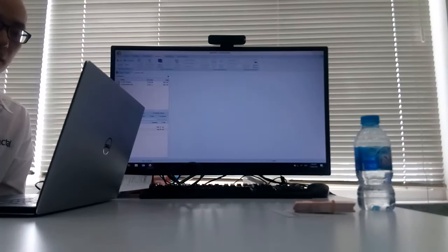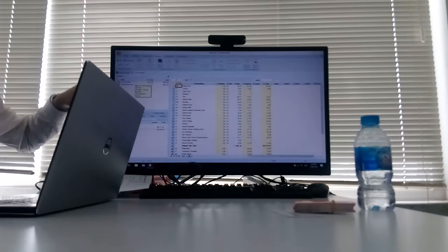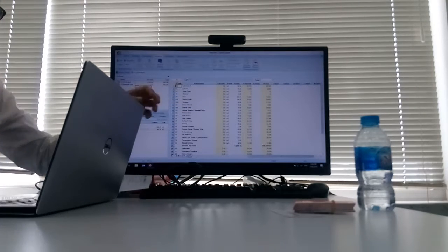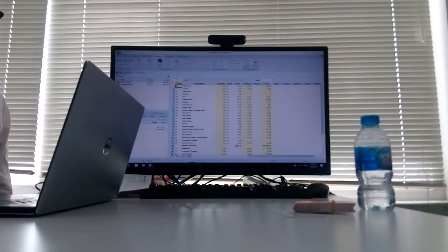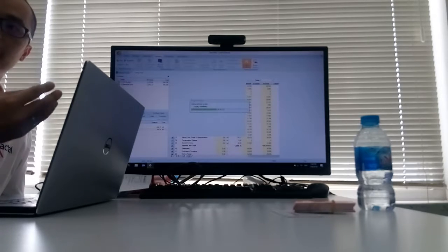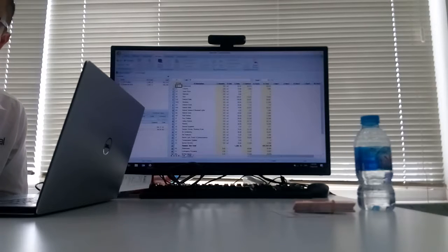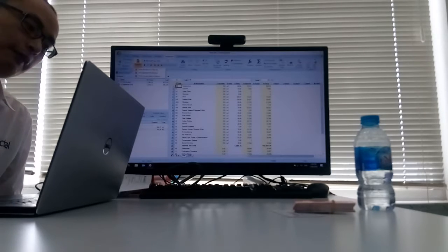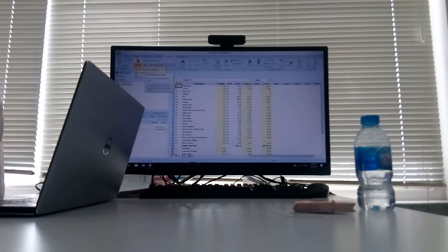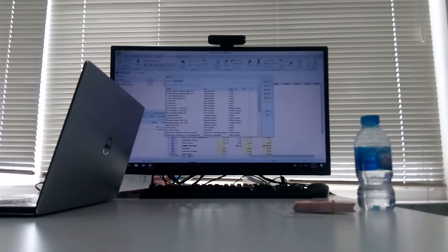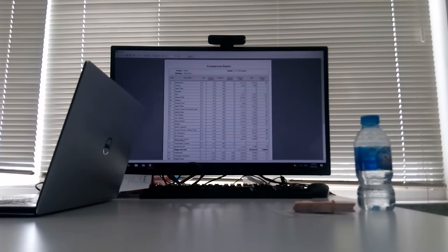This measurement we can also bring to our costing. In the costing, if you have the initial budget, it will be logged. Once we click promote workbook, the software will refresh based on the revision and update the quantity accordingly. You can see we have the quantity 359. For management, they definitely want to know the impact of any revision. If you have done the costing properly, in the comparison reports you can preview this. This is just a quick preview of this revision.